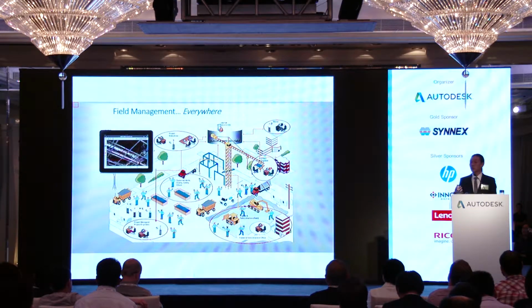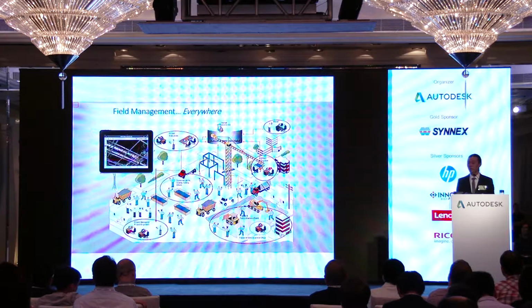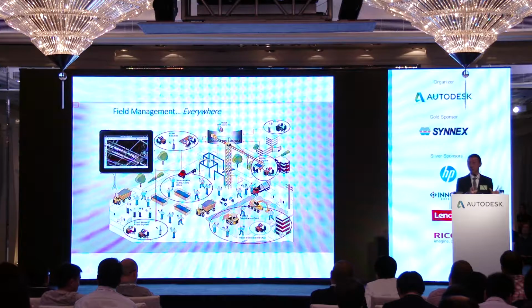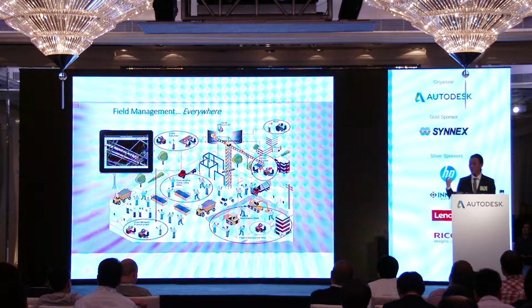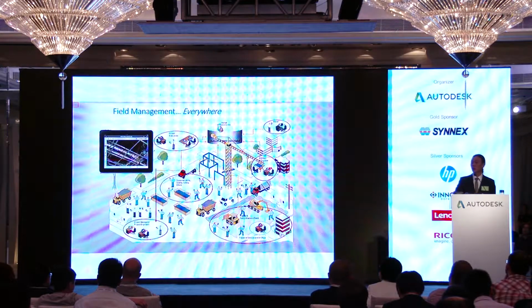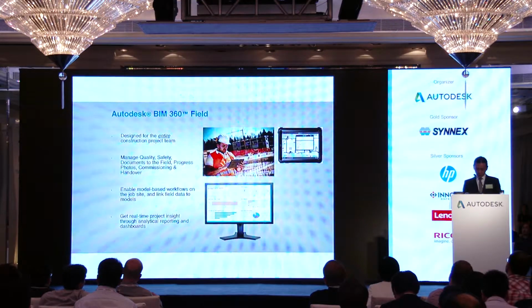And Field-wise, it's to do with collecting the actual data on site, because Glue and Field actually link. We've been doing coordination and collaboration within the design team, but we cannot get the latest data from on site. So the subcontractor actually inputs the data themselves. And I can see all the data from Field, and I can input it back into Revit and Glue it back up to the iPad for everyone to review. So it is a workflow with Glue and Field.